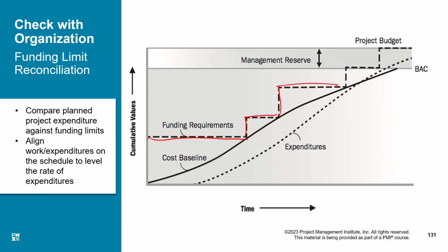funding requirement. Once your budget has been approved, budget at completion, that means you get this X amount of money for the whole project. Then they release the funding to you. But that funding does not get to the project in a lump sum form. They do not give you all the money upfront. Actually, they divide your funding requirements into various installments.